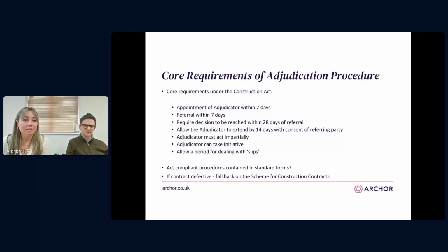The adjudicator must act impartially, but she or he can take their own initiative in asking questions of the parties, for example. There must also be a period for dealing with slips. Liam's going to talk about this a bit later, but the slip rule basically allows an adjudicator to correct any clerical or typographical error. And this period is 5 days from the date of the decision.